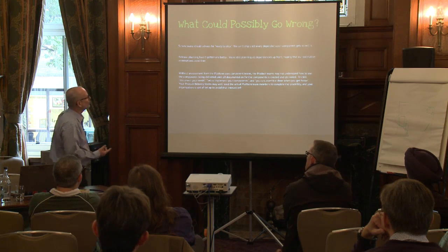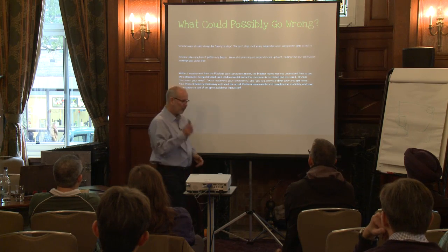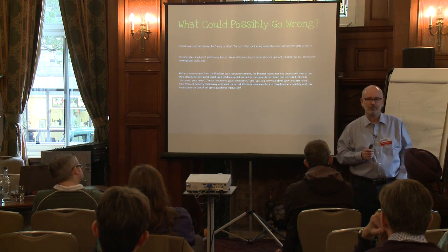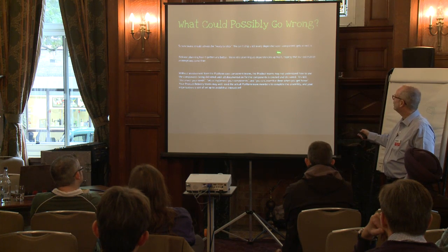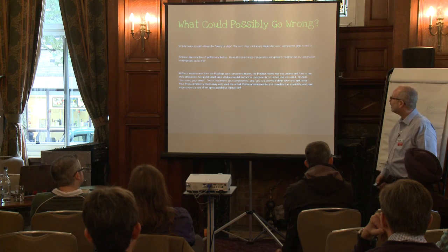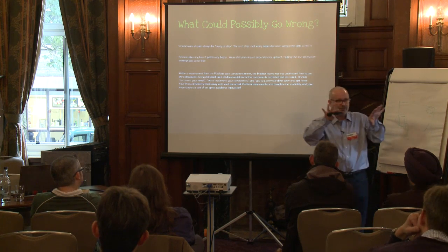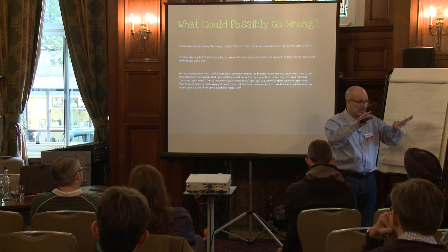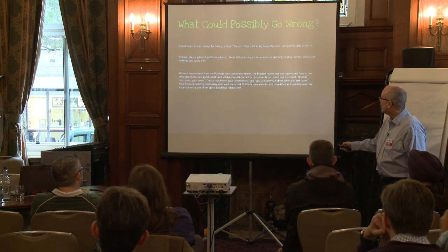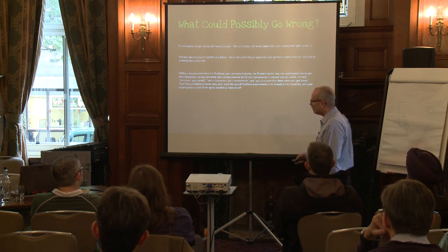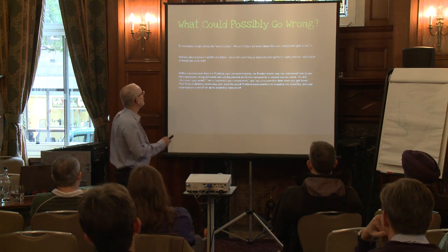Problem is that those Scrum teams always have to be ready to ship, right? And if we're depending, this is hard to do, if we're depending on stuff coming out from the platform teams that are using planned, predictive, waterfall type work, well then we can't be ready to ship until we get their stuff wired in, right? So we haven't accomplished a whole lot. Our release planning, it doesn't get any better, right? We still need to plan all the dependencies on our components, on our platform components, so that we can start planning our own products, on the Scrum side of things, right? And we got to get past the point where the platform people need to understand everything up front, right? So we really can't get past that.